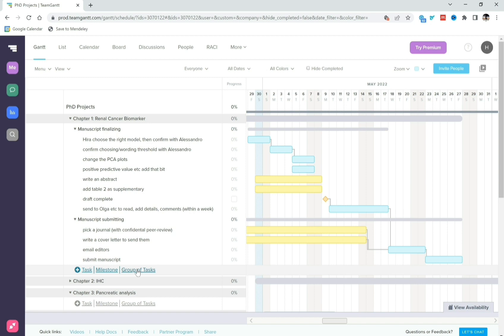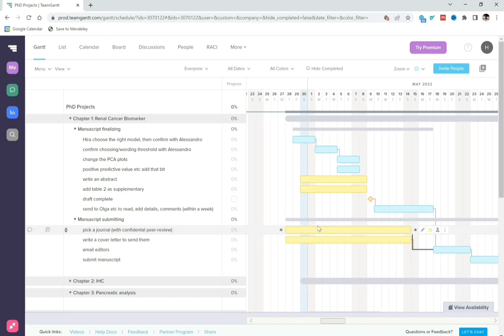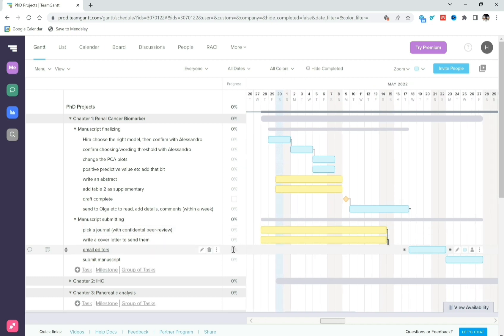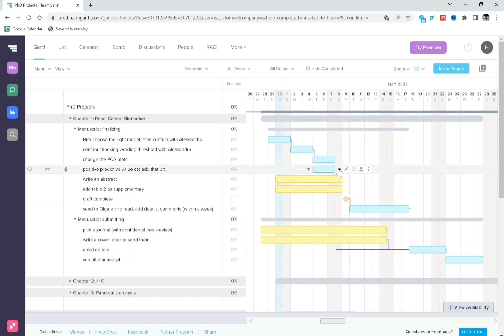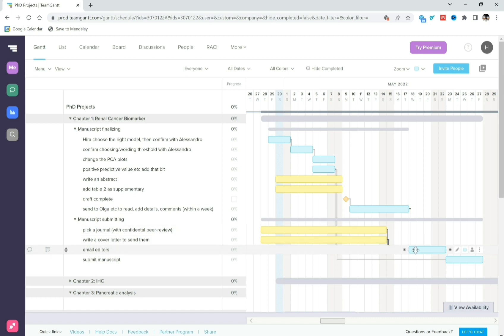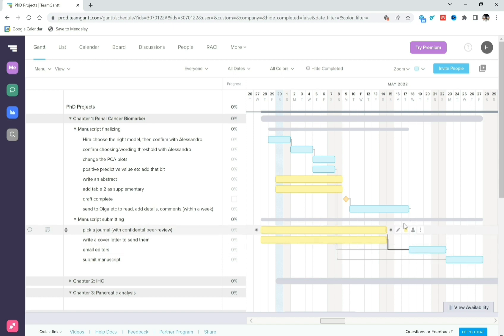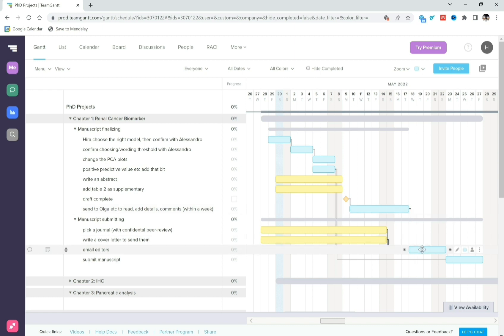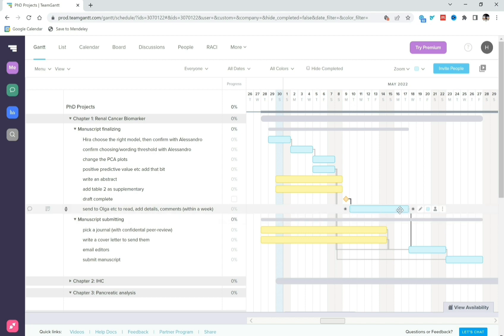It gives you so much so much control. So for example now what I actually need to do is I then cannot submit the task. So for example I cannot email the editors or submit the manuscript until I have the abstract as well. Therefore I'm going to link this to emailing the editors as well, and I can also link this to submitting the manuscript. So you can have multiple things coming in. So for example now I need to know, okay what do I need to do before I can email the editors? So it shows all these, it highlights all the paths and all the dependent tasks. So I can see that I need to write a cover letter, I need to pick a journal before I can email the editors, I need to send this to our collaborators and get their comments, I also need to finish up all of this stuff. And I can link all the milestones to these tasks as well. So all of these tasks need to be done.